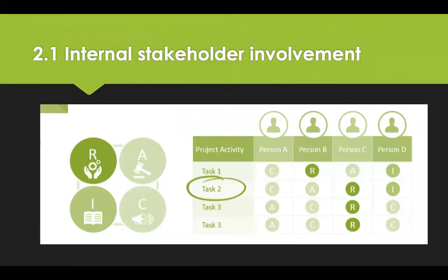Now, internal stakeholders will need to be involved in strategic sourcing. We need to identify stakeholders and their roles and responsibilities. We'll need to ask, who is responsible for the activity? Who is accountable? Who needs to be consulted? And who needs to be informed? And this is known as the RACI model, which you can see on the screen.